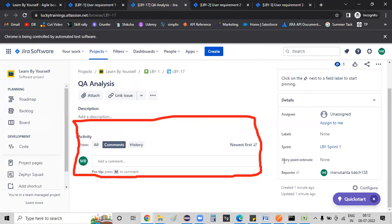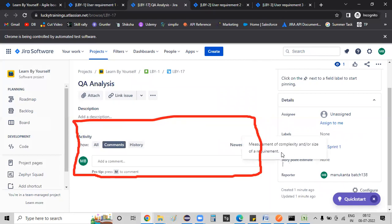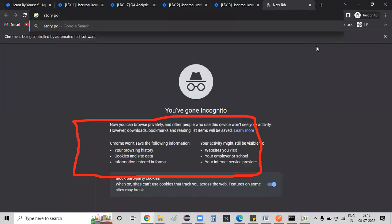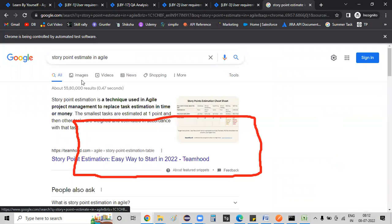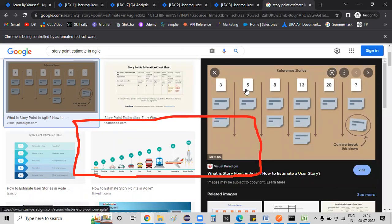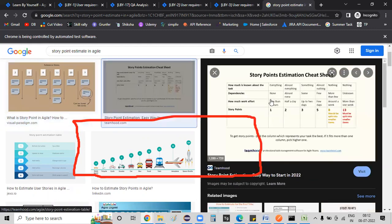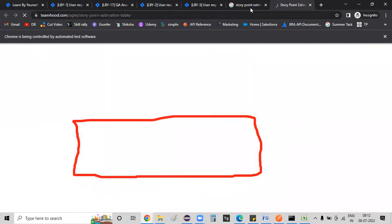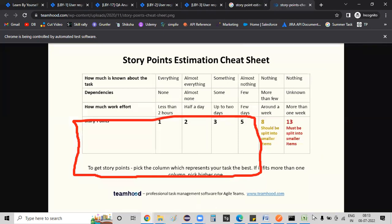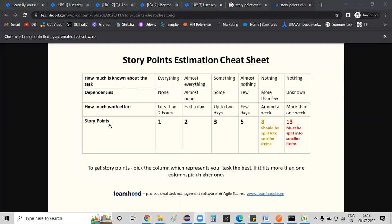Story point estimation measures the complexity of a requirement. In Agile, this is just — Google 'story point estimation.' The Fibonacci scale used is: 1, 2, 3, 5, 8, 13, 20. Google 'story point estimation cheat sheet' and open the image in a new tab. See the image. Story point 1 is the simplest — we will give it one story point.